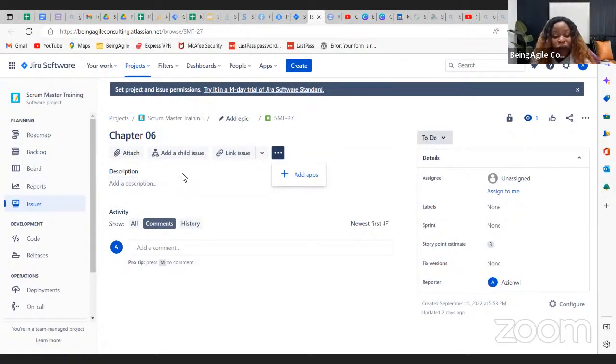And then now, let's say, for example, we've entered all those estimates at the task level. That's what I need you all to get. Hours apply at task level. Not at user story level, that is not best practice. Hours apply at task level.